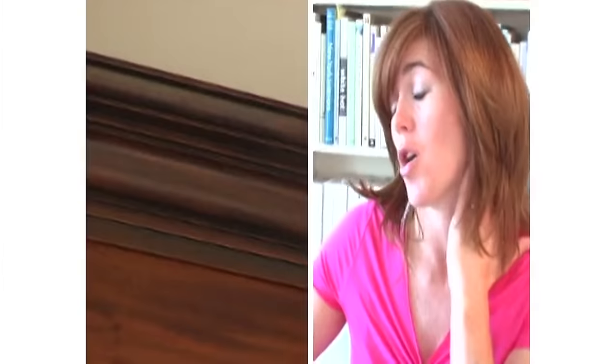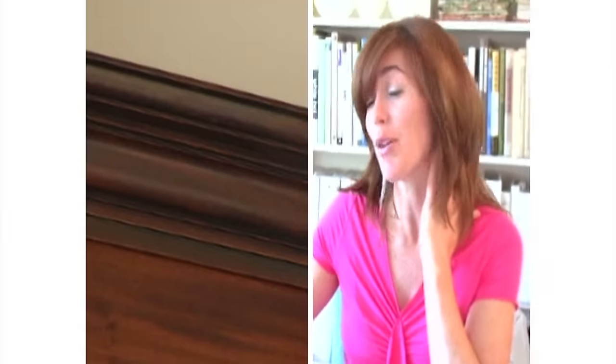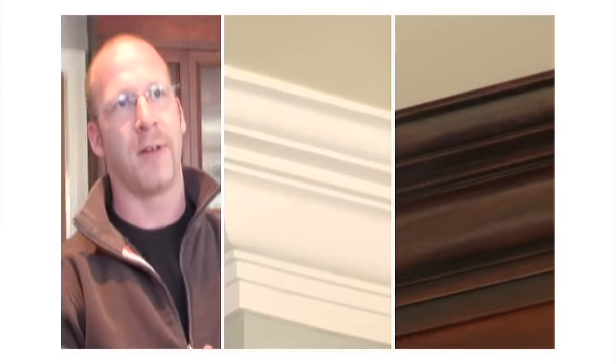Ling, did you get your wood moldings installed? Oh no, what happened? Solid mahogany crown moldings that were made to perfectly match the plaster crown moldings do not match. The crown didn't add up with the plaster crown that was going around the room, and also the profile of the crowns weren't perfect to my liking, so we had to send them back to Montreal. And it's now going to be 2 weeks till we have new moldings made.